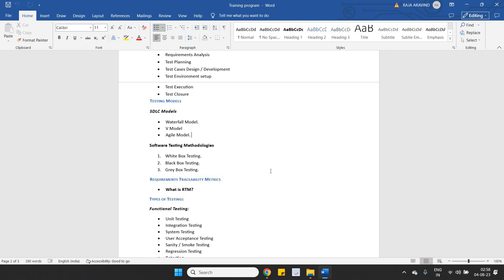You might ask me, as you have mentioned, the project is divided into multiple parts. So if one part is developed in 2 weeks, can another part be developed in 3 weeks, and another in 4 weeks? No. It is a fixed length. Sprint is a fixed length of duration that is iterative until the project is completed. If there are user stories 1, 2, 3, 4, these 4 stories need to be developed within these 2 weeks or 3 weeks or 4 weeks of sprint.